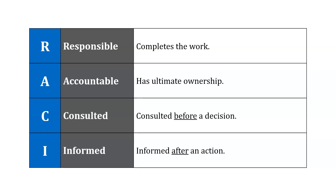If you're responsible for a work package, you're the person actually assigned to do the work. If you're accountable, you make the final decision and have ultimate ownership — often the boss of whoever's responsible. If you're consulted, you must be consulted before a decision or action is taken. If you're informed, you must be notified after the action has been taken. So consulted is before, and informed is after.